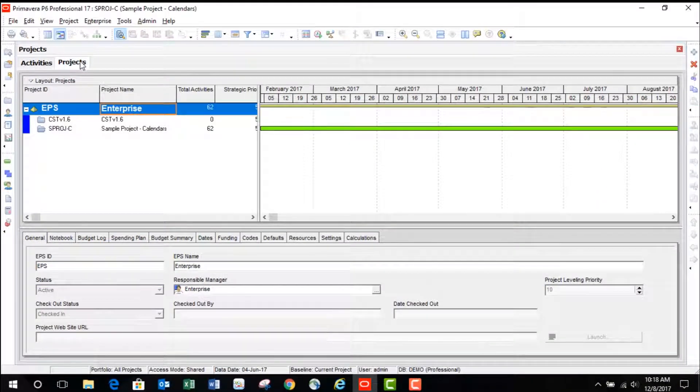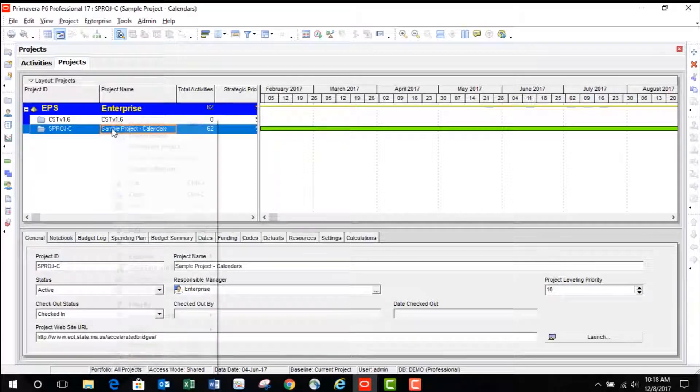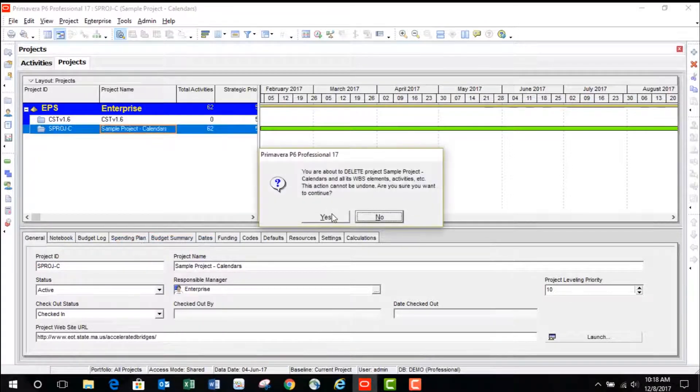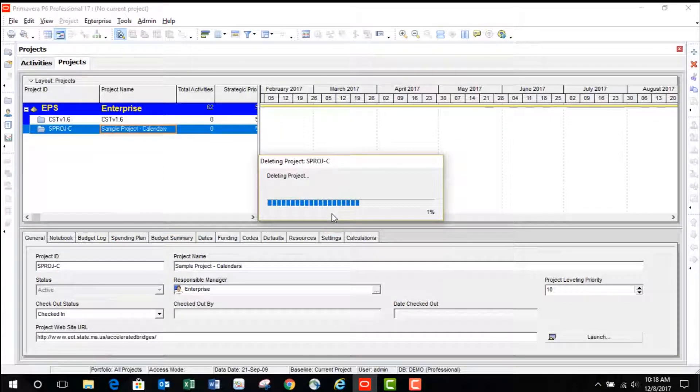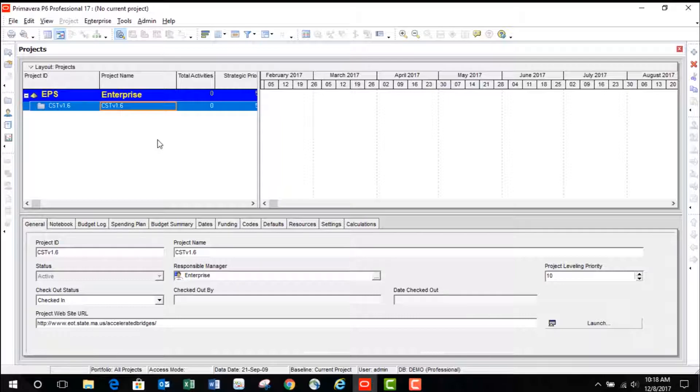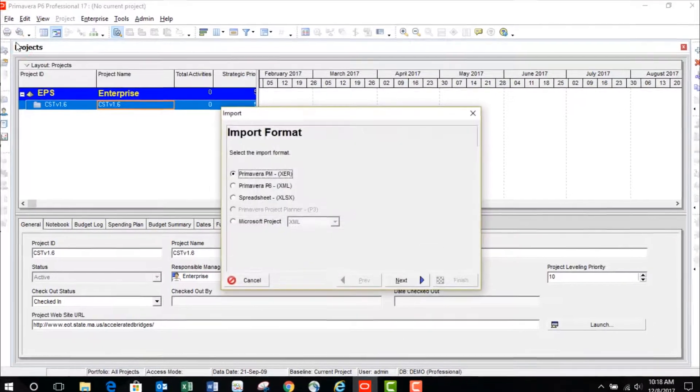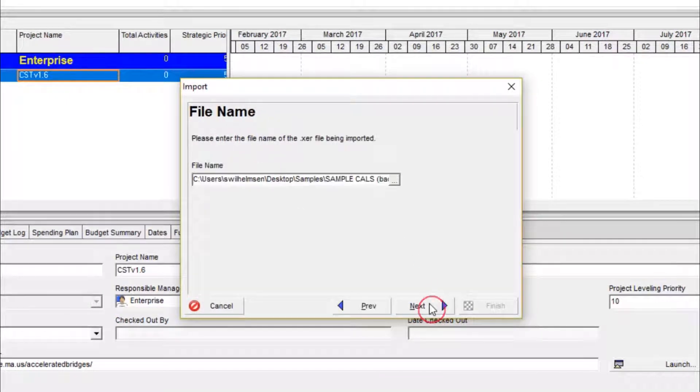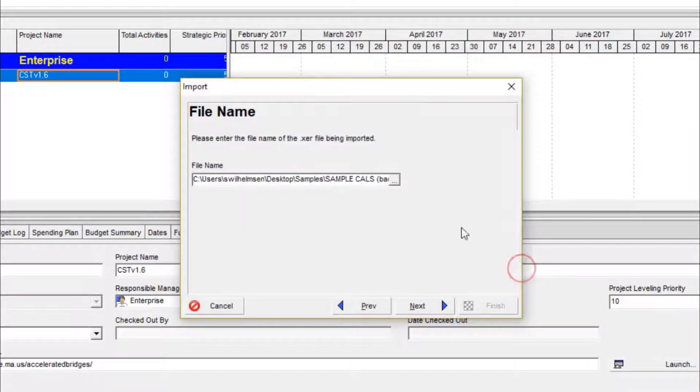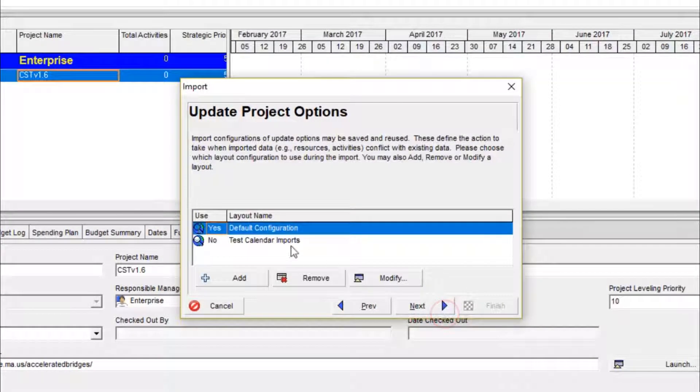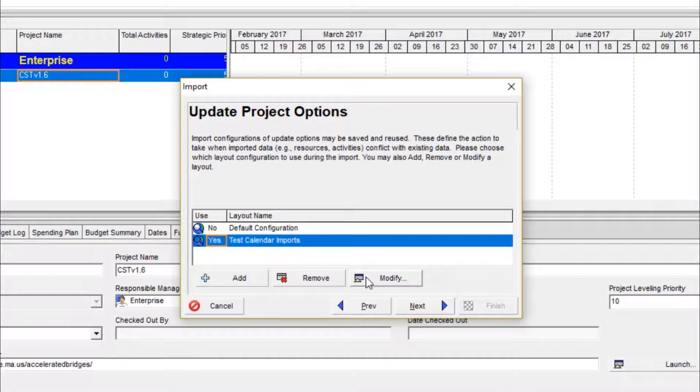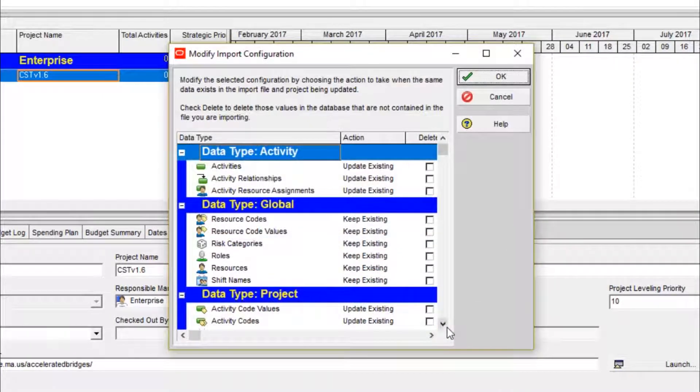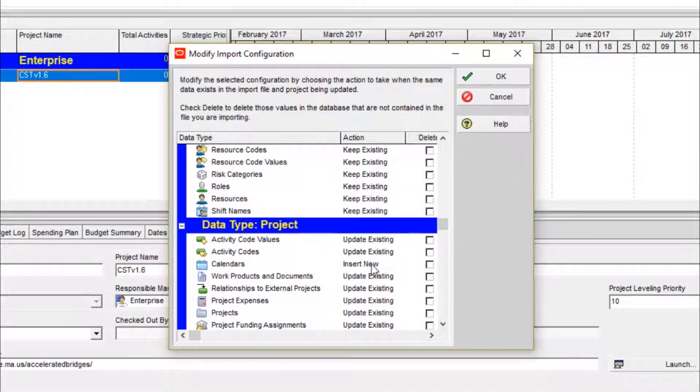So let's delete this project and re-import it again with different import settings. This time we're going to add new calendars to our database without overwriting our existing calendars. Clicking the same XER file. Now I've already set up these import configurations to insert new calendars.